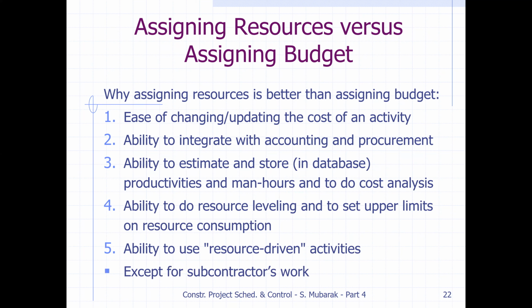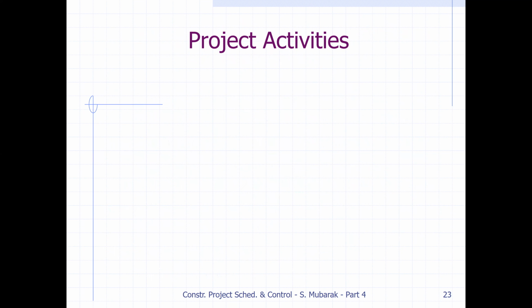So this will also help, except for the subcontract work. For the subcontractor work, we don't assign resources. We can assign the budget. Okay, so let's move forward.